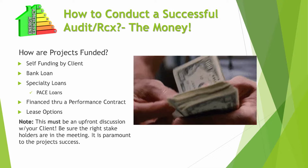You may have to do things on a master planning basis. You do something this year. Again, I talked about the original cooling towers. They had us design the project so they could replace one cooling tower per year. That meant for three years I was doing projects, and we had to keep coming back and changing the drawings to show that after one cell was in, it became existing and the next one had to come out, and so on. But it's what they wanted.